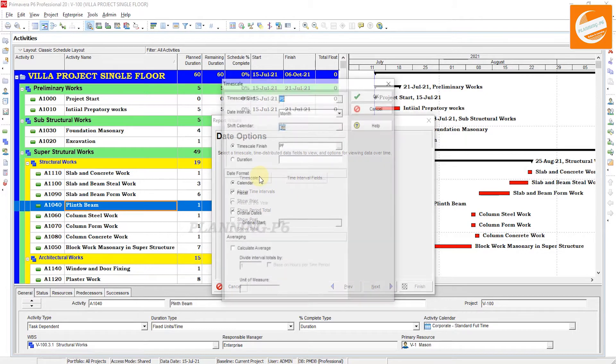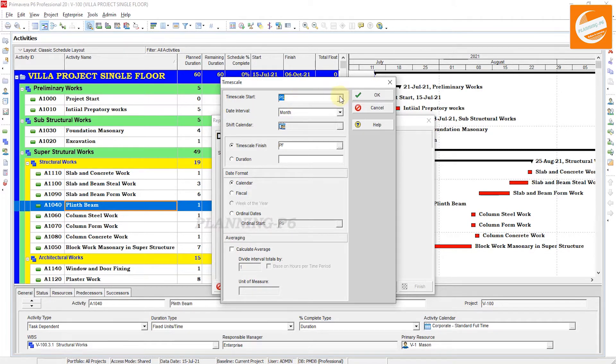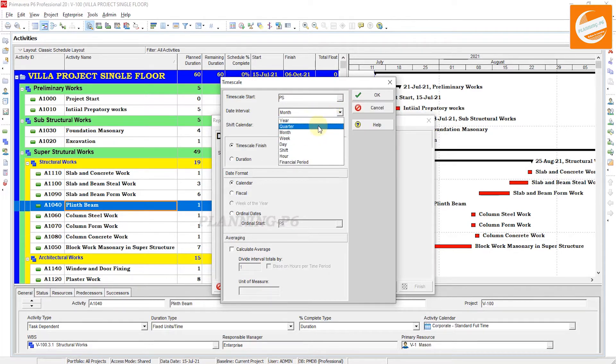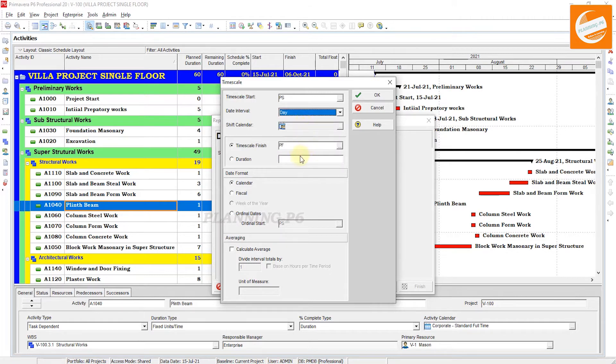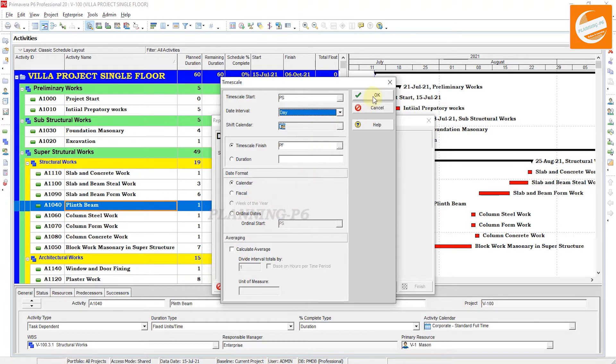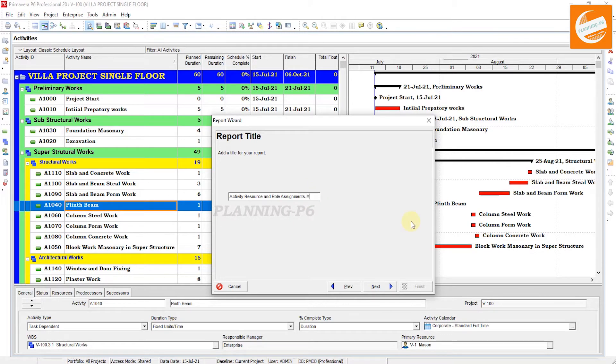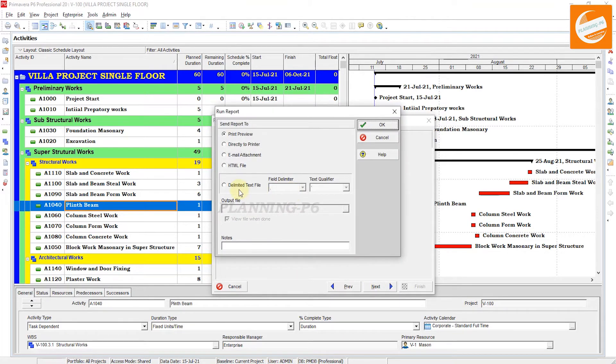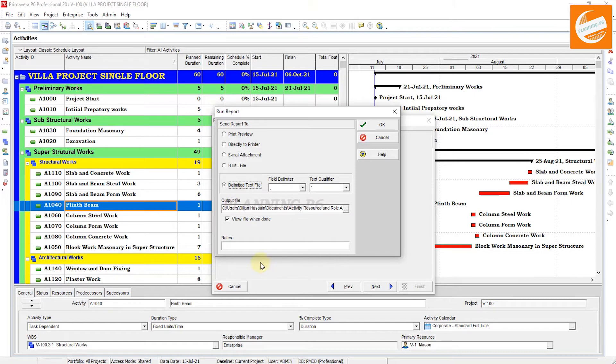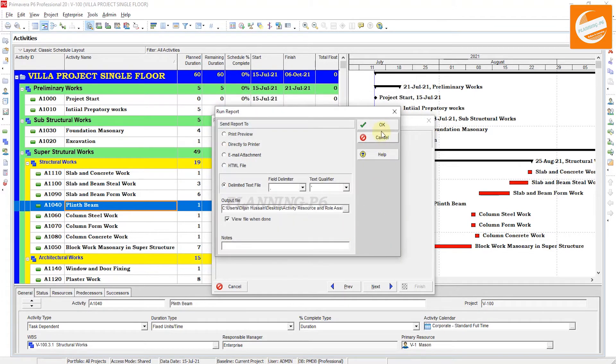Time Scale: if you need from the project start, select Project Start. If you need from a specific time limit, you can mention here with the custom date. For the year, quarter, month, week, day, shift, or financial period, we need Daily. Then Time Scale Finish: Project Finish. Next, the resource sheet name, if you want to change the name. Next, Run Report.